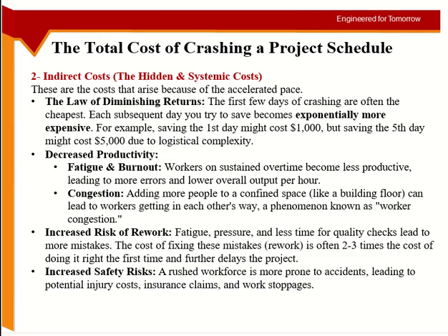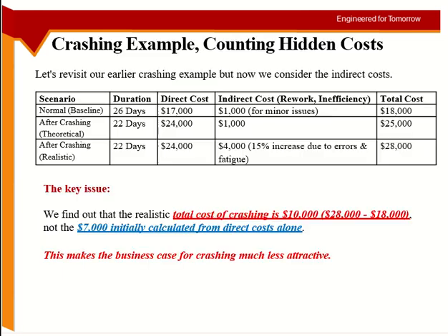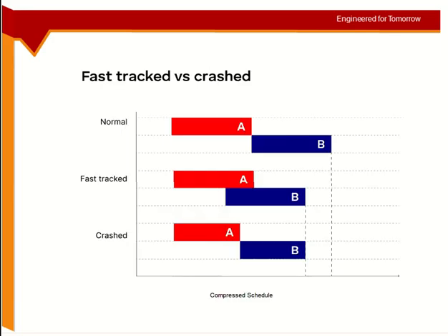Now he will say, okay, if one room goes for $1,000 or $500, in the extra 4 days I may earn like $6,000-7,000 extra, but I'm spending $10,000 for getting it 4 days in advance. So he may say no, I don't want to do it. But if he is getting, for example, $8,000 extra and you did not give him this practical scenario, the indirect cost thing, he will agree. He will say, okay, I will still get $1,000 extra or maybe more, depending upon the client. So this is how the client may decide.